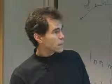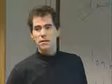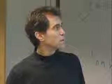So that shows you starting in October '87, ending in April '98. That was the plan. We actually took about 9 months more than what you see there because of all the problems that we had. A key point is when you're pressed for time, don't cut corners. We did review all the testing, and we didn't delete any testing that we considered was mandatory. And in fact, we added systems testing to verify that we had total system performance, that we knew what this thing was going to do. We also added some testing, end-to-end testing in thermal vac.